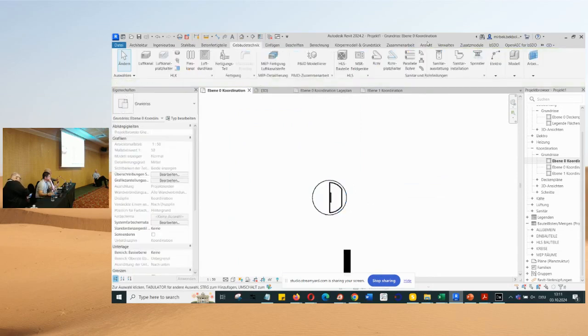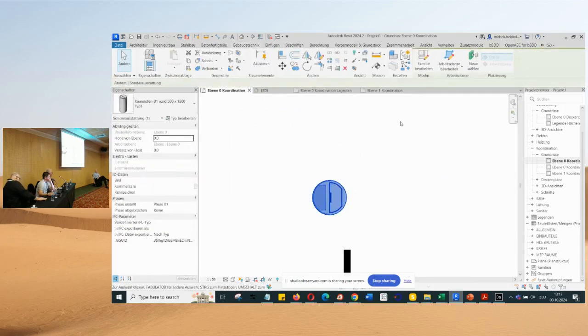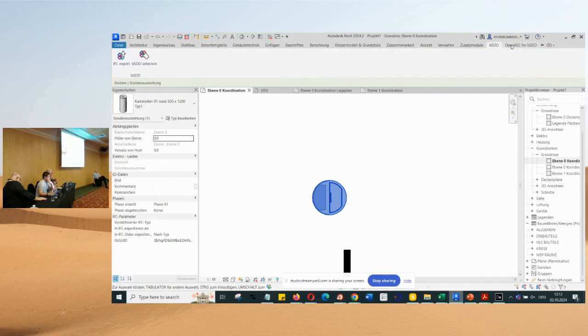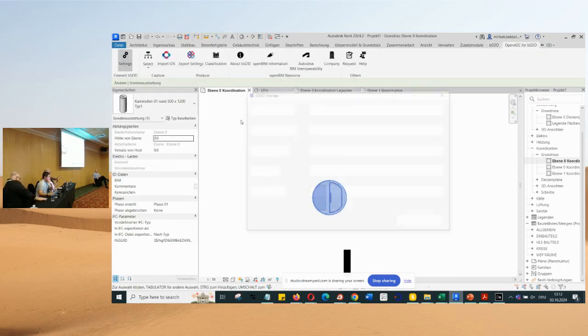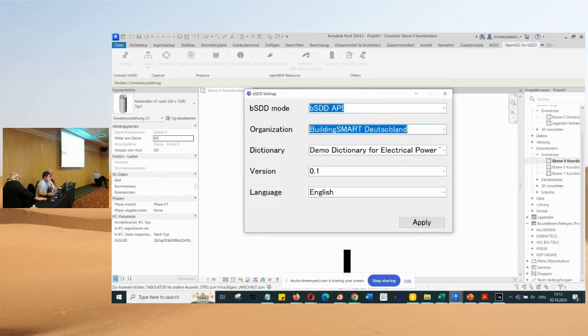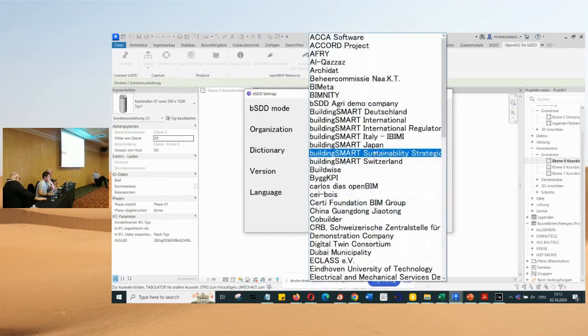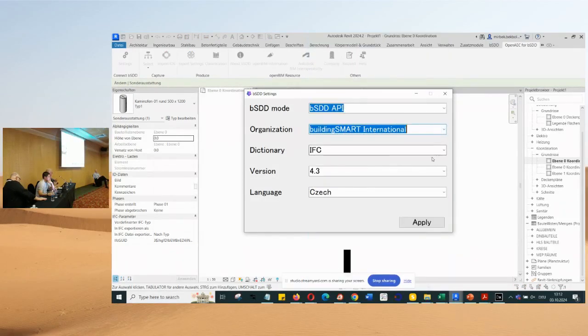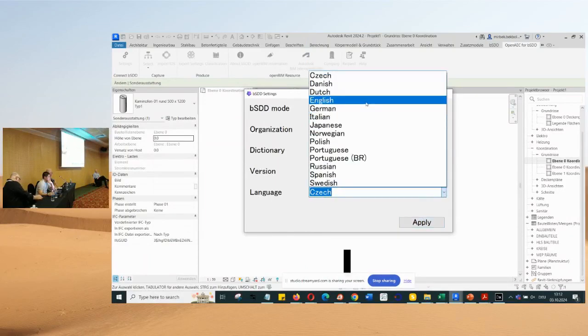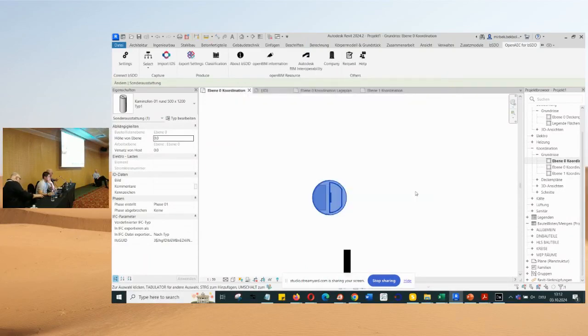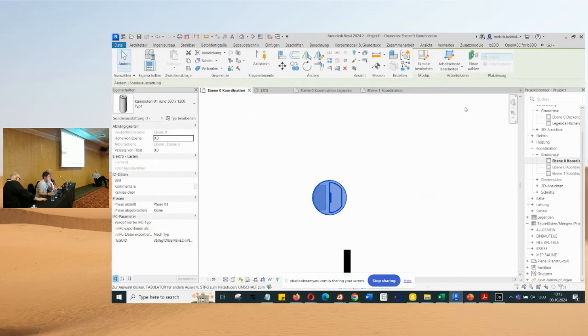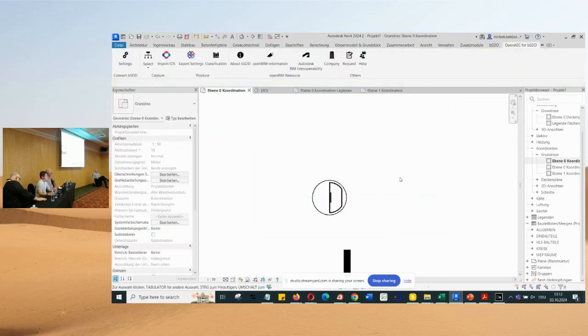If you've gone to the cost calculation stage, then I use the output from the cost calculation, because then I have the methods more. And when I get into the as-built stage, then I use the model again, and then I have most of the information I need about identification of materials.